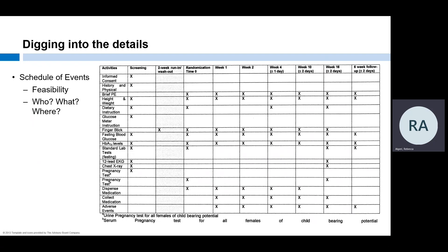The schedule of events provides key information about the timing of study visits and what must be completed at each. As you can see, this is generally presented as a table listing all activities in the first column and visits in the subsequent columns, with an X marking which visits will have each activity. Reviewing the schedule of events is an important element of protocol review when considering feasibility. Are visits spaced out enough for scheduling? Are there windows for each visit? Some visits may have windows and some may not, which will be important when scheduling subjects.